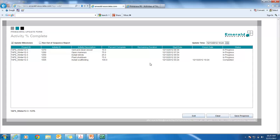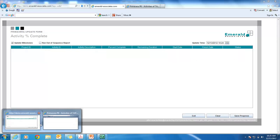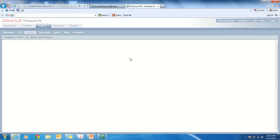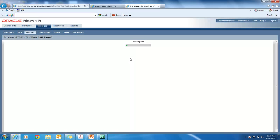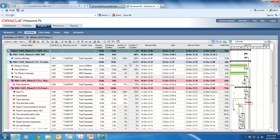In a matter of 10 seconds, I've been able to scan five activities. These are being held in TAPS — they haven't been sent over to Primavera yet. So I can check them and make sure that everything is right, and then I quickly click Save Progress and jump back over into Primavera. All I do is press F5 for an update, and it will pull the information out of TAPS and load it directly into Primavera. We can now see where my activity percent used to be zero.